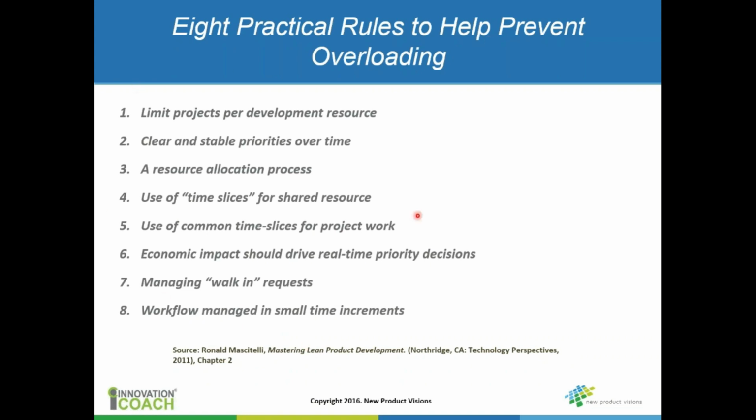And before we dive into these 8, I'll make a couple points to you. First, the discussion today is going to assume that you have some process in place to actually pick the right projects. That's an important process. It's really what we term the project portfolio planning type process. And you have to have some way to decide what project is higher priority and what's lower priority. You might rank them from 1 to X. You might group projects in A, B, and C. However you do it, you have to have some way to delineate.